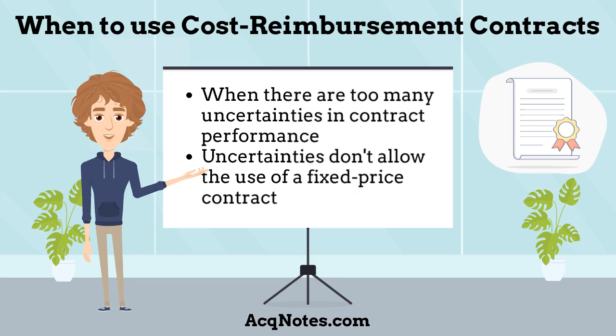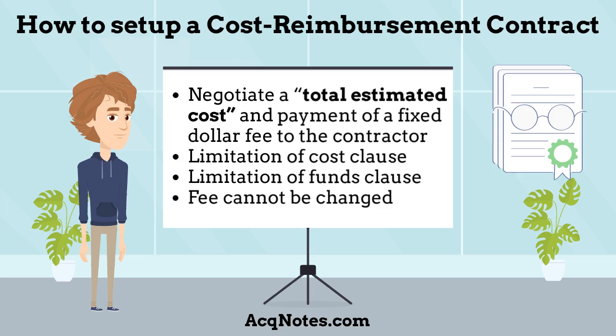When should you use a cost reimbursement contract? A cost reimbursement contract should be used when there are too many uncertainties in contract performance that will not allow the use of a fixed-price contract. How to set up a cost reimbursement contract?